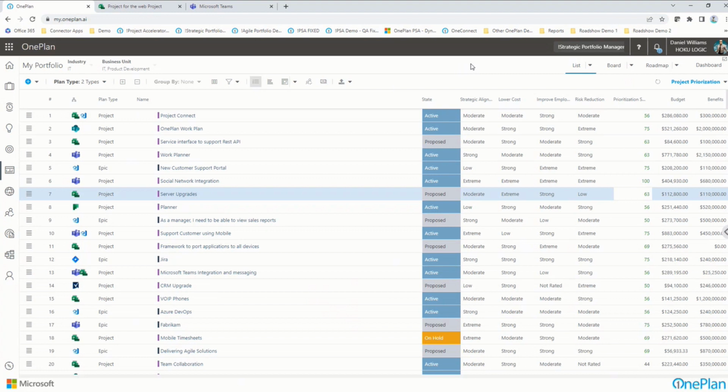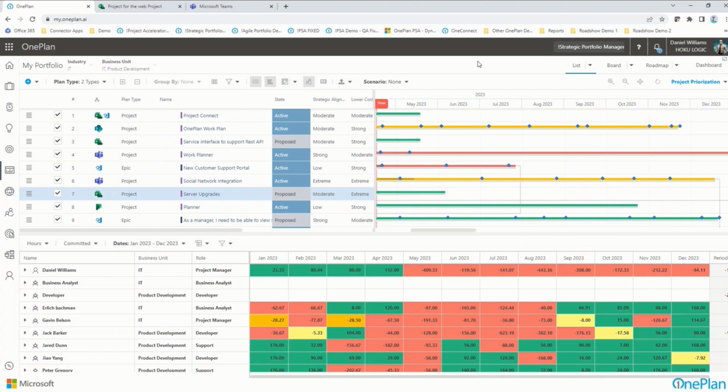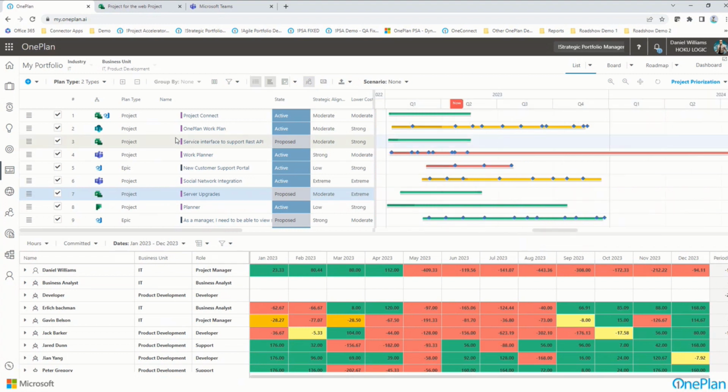So in this particular case, let's marry this ranking with a resource constrained type of analysis for what if analysis. Now, by going into this mode, I'm actually looking at this from, here's the projects I hope to do. They're all checked at the moment. And this is what it's going to take from a resource perspective, but it looks like I don't have all the resources that I need in order to get this model accomplished.